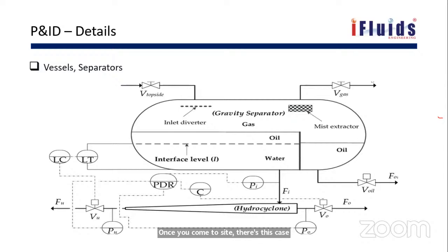Because we cannot demolish the fourth floor, right? If it is a mezzanine floor or a spray tower, we cannot go and demolish it. One more thing happened with a generator. They made a copy-paste of the existing generator and gave all the data to the vendor, and finally the vendor came with a larger footprint. The generator set comes completely on a skid, and they place the skid directly. But once it came to the site, they did not have the space to install it.